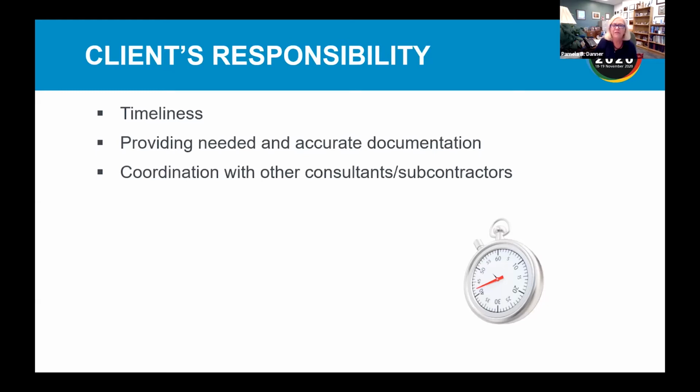The client and other contractors need to provide required, accurate, and complete information within certain timelines. This needs to include drawings, specifications, services, surveys, and reports pertaining to the project requirements, as well as other documents affecting you as the consultant's work, such as estimates of construction cost, bidding documents, and contract documents, including change orders. The client needs to have its electrical engineer review all lighting documents in a timely manner, which includes conformance to all local codes, and in Europe, in many cases, a national code.